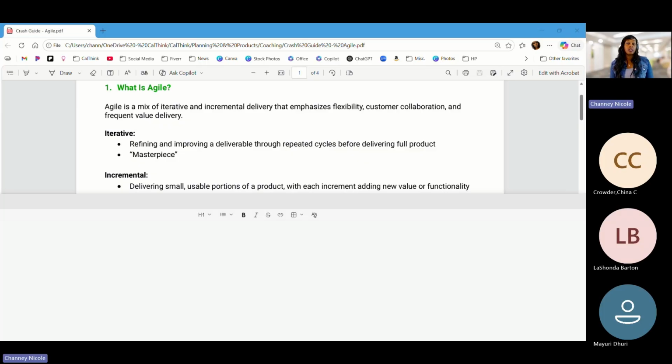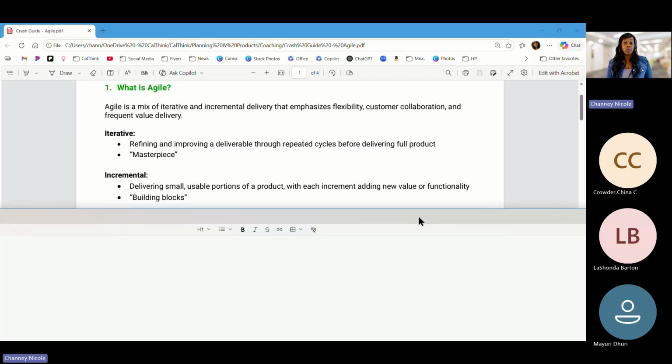And then we added the ability to save your favorite food items. So that's another increment of value or an increment of functionality that was added to the app. And then you added the delivery piece. And then you added maybe the customer loyalty piece where you gain points for each order. So it's delivering the product in increments. And eventually you'll get to a full-blown app with all the bells and whistles and features that were thought of at the beginning of a project. That's incremental. And I like to call that the building blocks approach. So you still have the same scope, you're just kind of breaking it down into different chunks of work. Whereas iterative, this might change depending on where we start and where we want to end up.